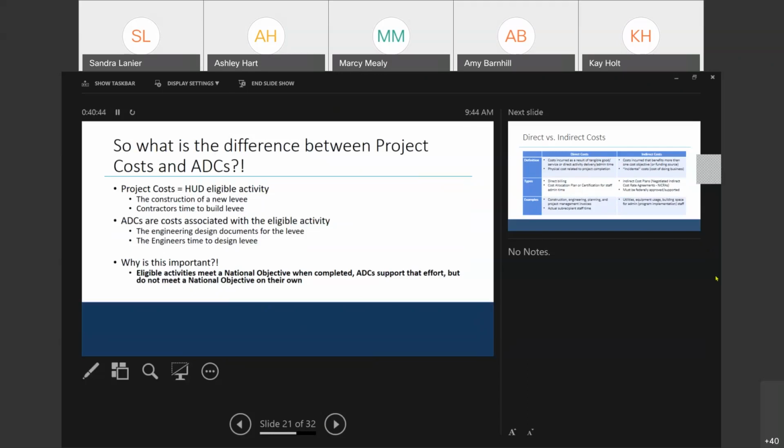Okay, another question. It says, so unlike the normal CDBG grant admin, it isn't sufficient for the UGLG to be a dues paying member for us to act as their admin assistants on this project. According to CDBG regulatory compliance across the program spectrum of CDBG, MIT, and DR, only a contracted entity procured by a competitive process may submit a proposal that builds in overhead and profit. If a RPC or COG is assisting in any aspect outside of that competitive process, then again, like I stated before, their reimbursement is based on that actual cost reimbursement.